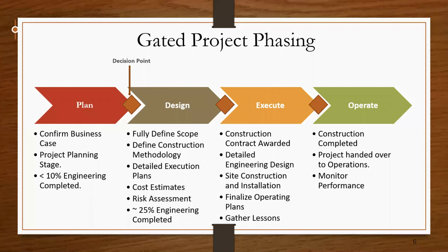The first part of that is the planning stage. At the planning stage, you confirm your business case and you begin to plan your project. You begin to plan how you intend to deliver your project. Typically at this stage, you will have completed about 10% engineering.